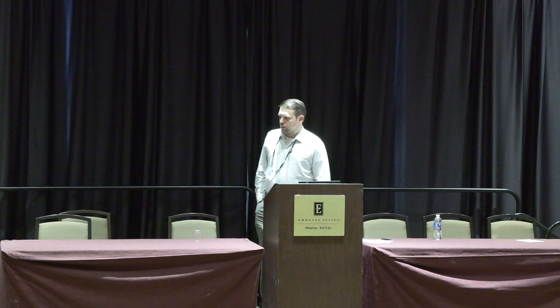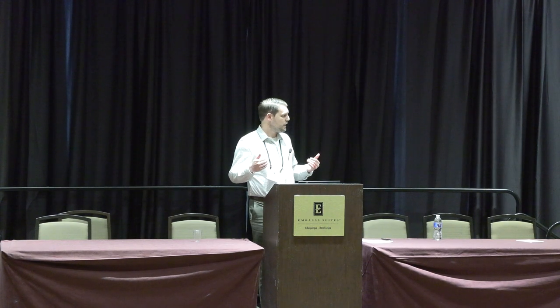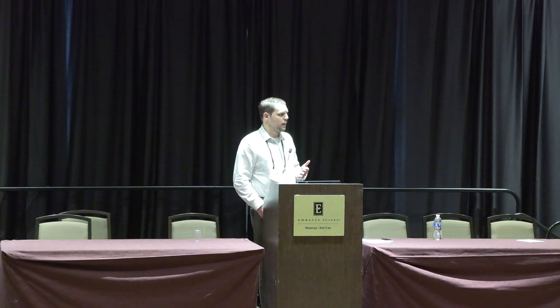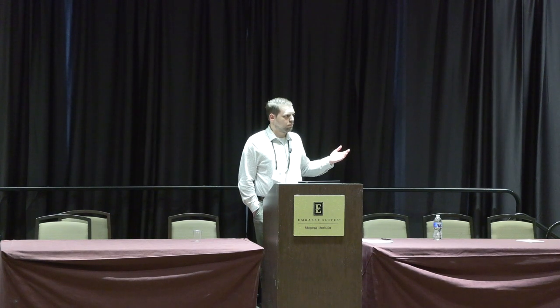Everything ties into the scope of work. For those who aren't drone pilots, this isn't your traditional Google Maps — this is actually the first map we go to and plot where the bridge is. You can see Denver International Airport centered here. As we get closer to the center of the circles, we have restricted airspace and have to get permits. Further out we get into Class G airspace and can get auto approvals. There are also other airports — Broomfield to the northwest, Centennial to the south, and Buckley Air Force Base — so even if you think you're not near an airport, you might be.